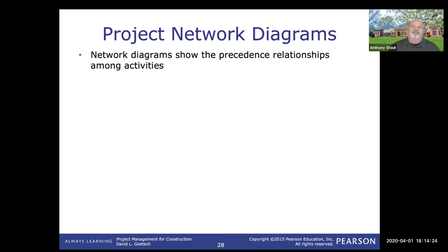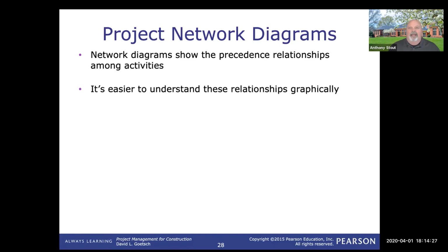So it shows this precedence relationship, and it's easy to look at and try to define or understand what things are important, and therefore what things as a manager you need to keep your eye on. The name critical path identifies the critical components that must be done. If things are not on the critical path, then they're not as susceptible to impacting the deadline of the overall project. There's some time in there, some leeway, some slack, and that's a term that we'll talk about.